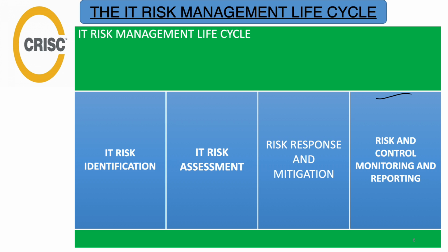Moving further ahead, IT risk assessment, that is to assess the risk. Once the risk has been identified, it is evaluated in terms of its likelihood and the impact or consequences. This prioritizes the risk that we really need to focus on and those that need to be highlighted within the risk register.